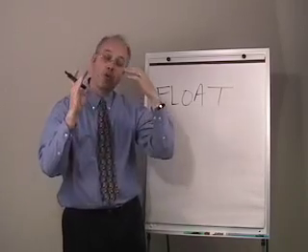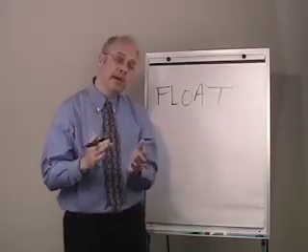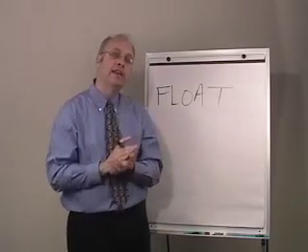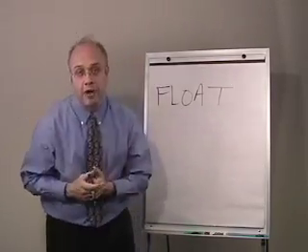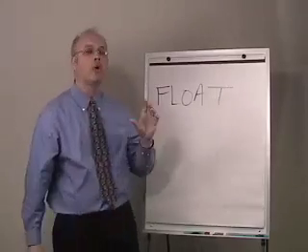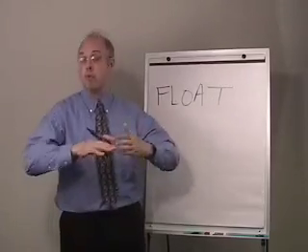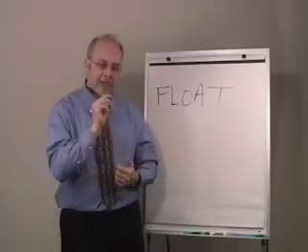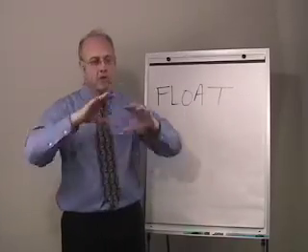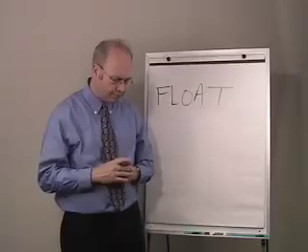Well, if that work had float in the first place, if I complete it a week early, it has 7 more days of float. In other words, by completing non-critical work early, I essentially give more float to the path that activity falls on, assuming everything else proceeds as planned.